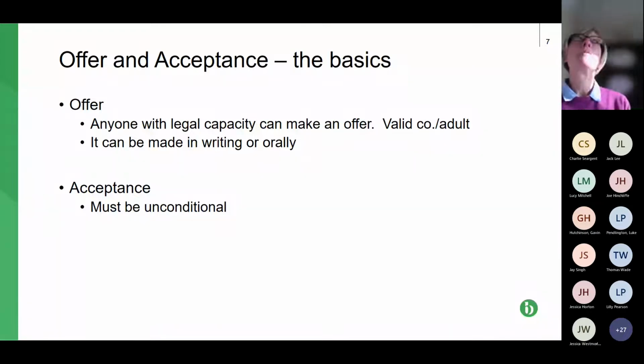What I would say in terms of protecting yourself, if you've made an offer or you've received an offer, and it's not in writing, confirm it in writing. All it needs to be is a quick email, or a text, even something in writing. Email's probably better, just to confirm that you've invited me to do this work, and the terms discussed and what has been agreed.